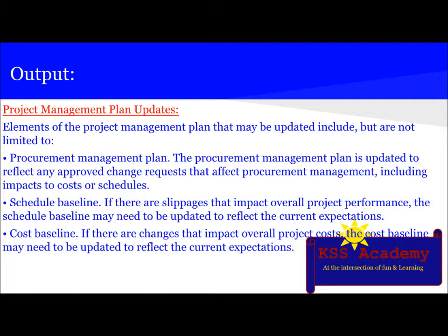If there are slippages that impact overall project performance, the schedule baseline may need to be updated to reflect the current expectation. Cost baseline. If there are changes that impact overall cost, the cost baseline may need to be updated to reflect the current expectation.